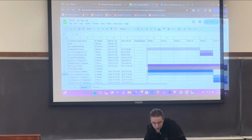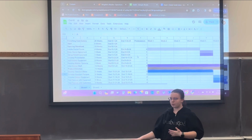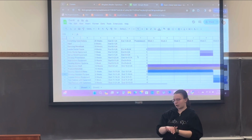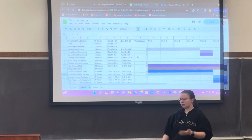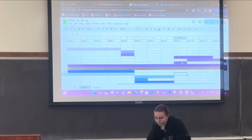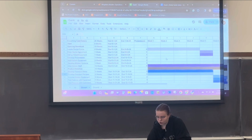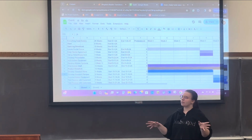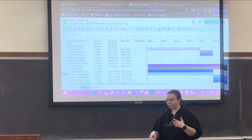Okay. So then we've got the rental agreement, which will only take about a week, setting up the retail equipment, and that's just set up, so I'm assuming that upon entering the rental agreement, I would have the stuff already ready for the retail space, cash registers, bunk cash, that type of thing. Okay. Developing the presentation would be 3 weeks because you need to work through what the store looks like and how to present it well, then adding the kitchen equipment, purchasing the kitchen equipment, and then making sure to get it put where it needs to be to where it won't trip breakers or it won't catch fire.